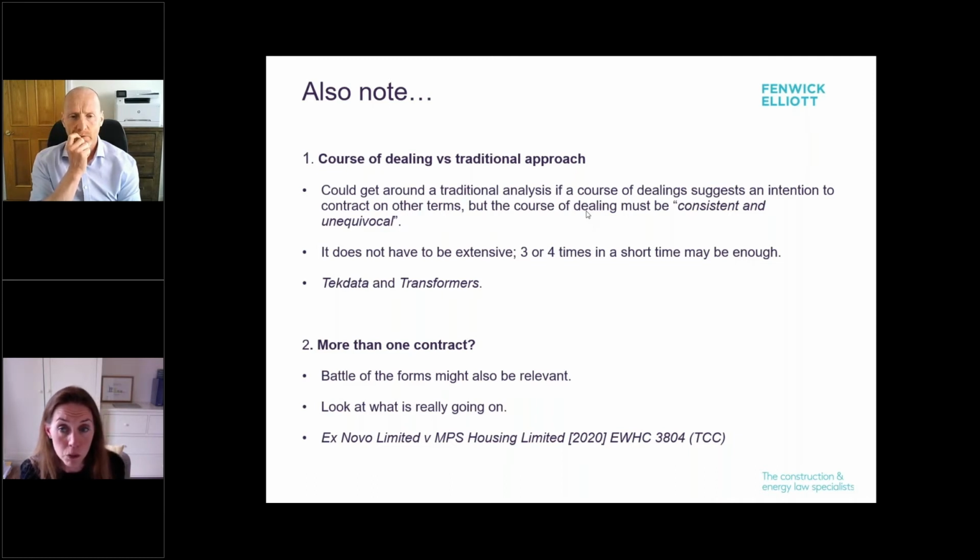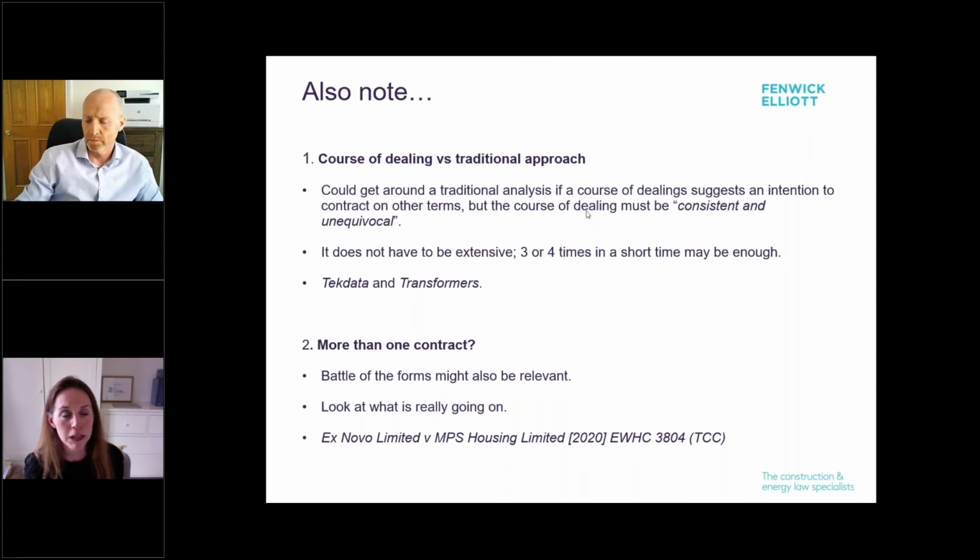If you want your terms to apply, you have to make it as difficult as possible for a judge or an adjudicator to find that anything else applies, ideally by getting yourself a nice signed contract document that everybody has put their name on. But if that's not possible, then you need to have made sure that you enforce your terms as much as possible and refer to your terms as much as possible and keep sending them over in the negotiation process. And with that, Dave, you have control of the slides.